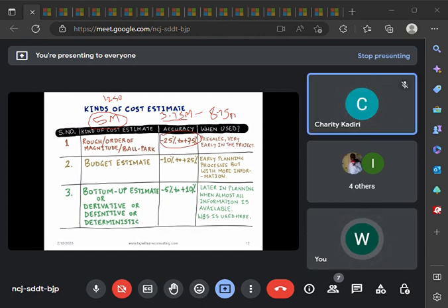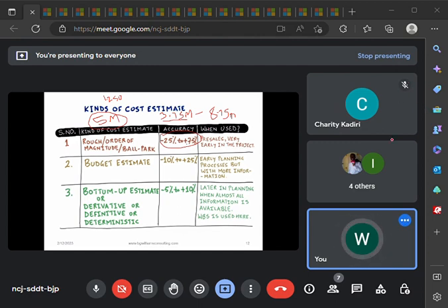All right. With that same standard, that is how this also follows. But now, when do we apply this budget estimate? You can see as it is written, early planning process, but with more information. At this stage, the budget estimate is usually done during project planning. So at that point you are now planning and you are now serious with information. You started calling the market, calling people to know how much is this, how much is that, what about that material, how much do I pay for your workmanship and all those things. You are now factoring in and putting all those plans together.